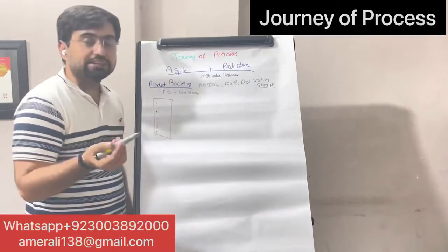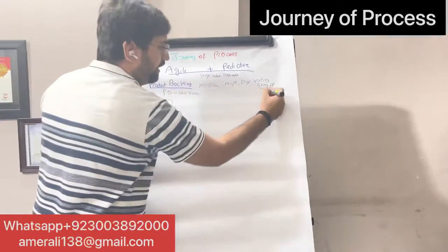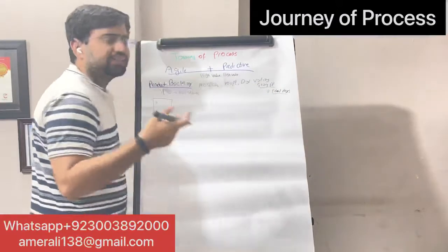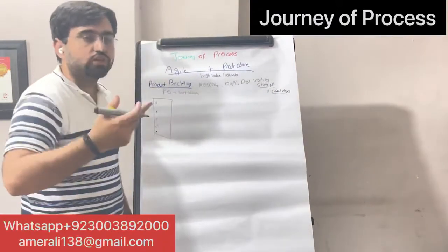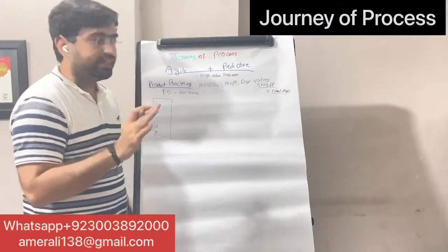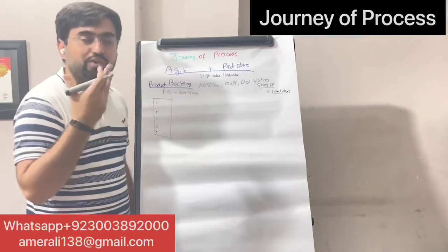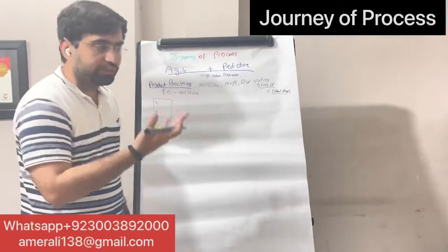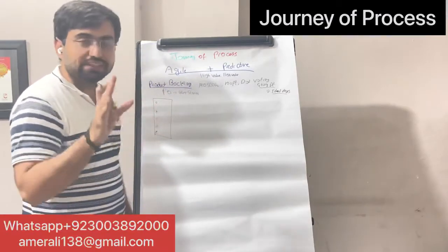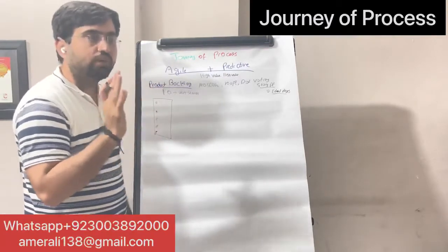Now, agile estimations are lightweight estimations. We can use 3 techniques for that. Ideal days. Since it is ideal days, ideal hours, we know that actual work will always be more than the ideal. Let's say it will take 40 ideal hours. We are assuming in 40 hours we will not take any unofficial call, we will not go to the washroom, we will not take food and those things. So this means we actually plan to fail. So ideal days always take more time.